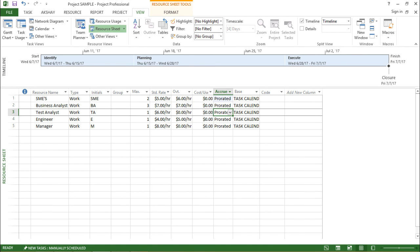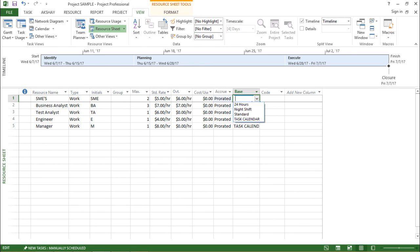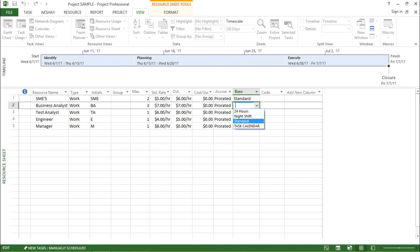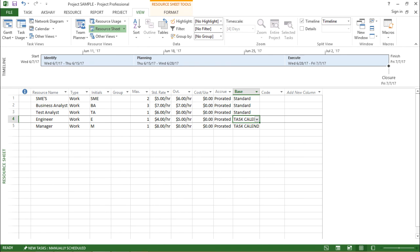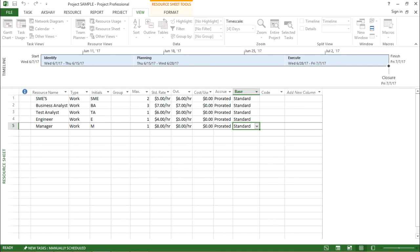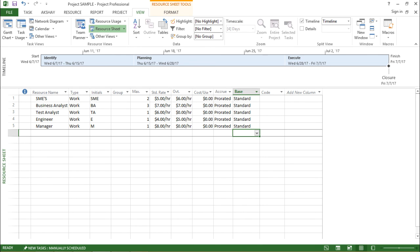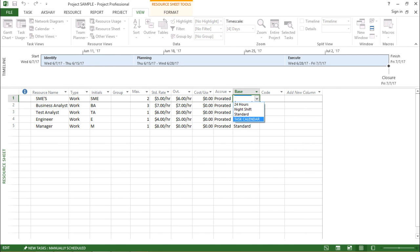Moving on to the last column: base calendar. If I click on this drop-down, it shows Task Calendar and 24 Hours — these are the different calendars assigned to that particular resource. I can select any calendar, such as Standard. The standard calendar means work starts at 8, first half ends at 12, second half runs from 1 to 5 o'clock. So from this drop-down I can select the particular calendar for each resource.